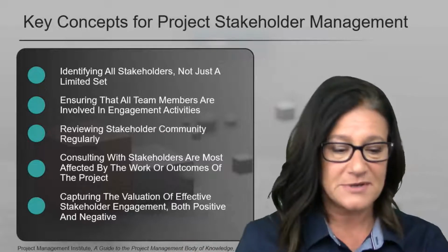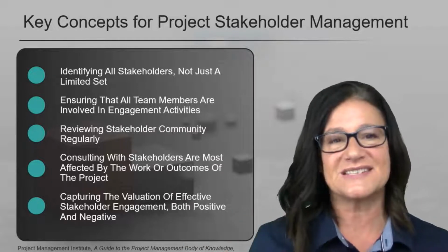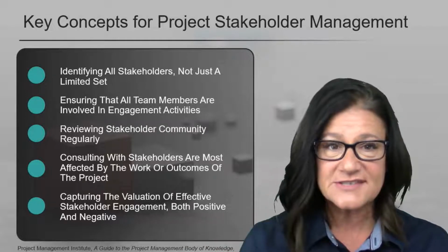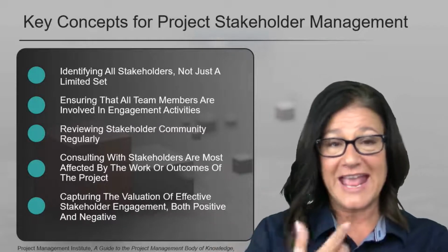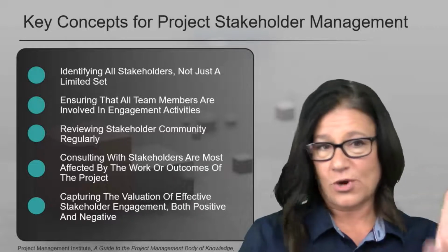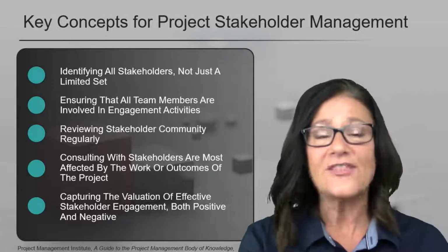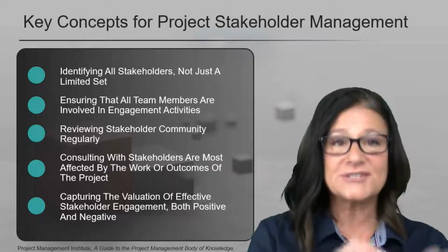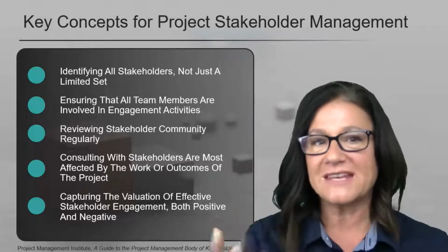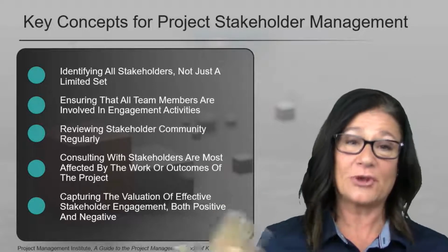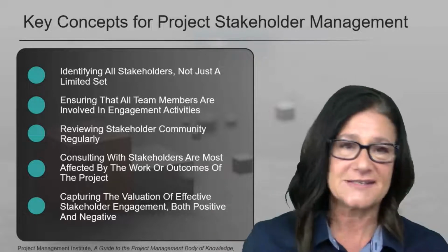One thing that I would definitely say is, if you're going through and trying to figure out whether this is a situation that's asking about communications, ask yourself, am I planning to distribute any kind of information? A report, an email, a meeting, I'm putting together an agenda. That is all communications. Planning and distributing information. Whereas stakeholder engagement is using good communication to build relationships, gain support, and try to reduce any kinds of